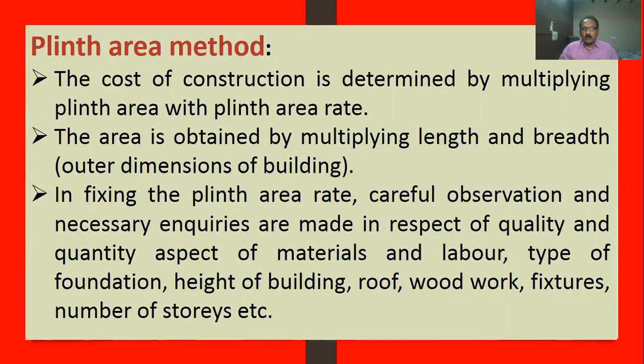You have to make all inquiries regarding the quality of materials and labor. What is the type of foundation? If it is weak soil, you require much more cost. So you have to study the soil properties and the height of the building.